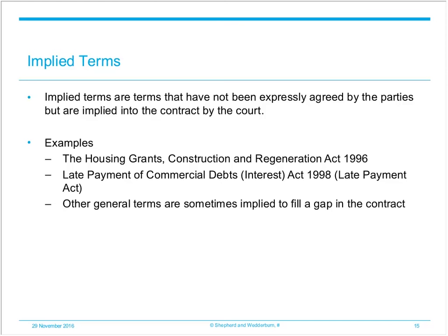A second example is the Late Payment of Commercial Debts Act 1998. This act gives businesses the statutory right to claim interest on late payments for goods and services from other businesses, as well as a fixed sum and reasonable costs for recovery of the debt. The current rate is 8% above the prevailing base rate.